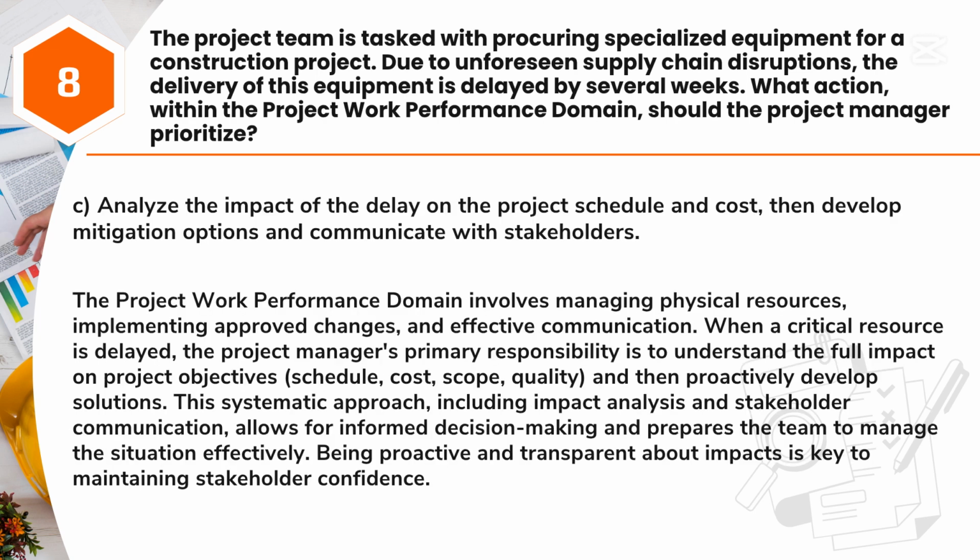Answer: C. Analyze the impact of the delay on the project schedule and cost, then develop mitigation options and communicate with stakeholders. The project work performance domain involves managing physical resources, implementing approved changes, and effective communication.